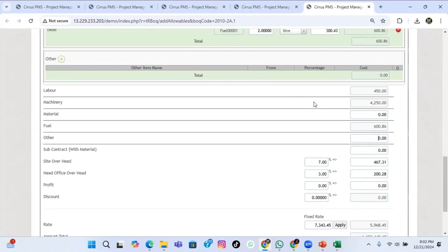I think it's a valid question. Sometimes for the tender, we don't have much time. As a lump sum, for some BOQs we don't detail that to that level, but we put some percentage, like for machinery, only the cost in the tender stage, and we prepare that in the tender.